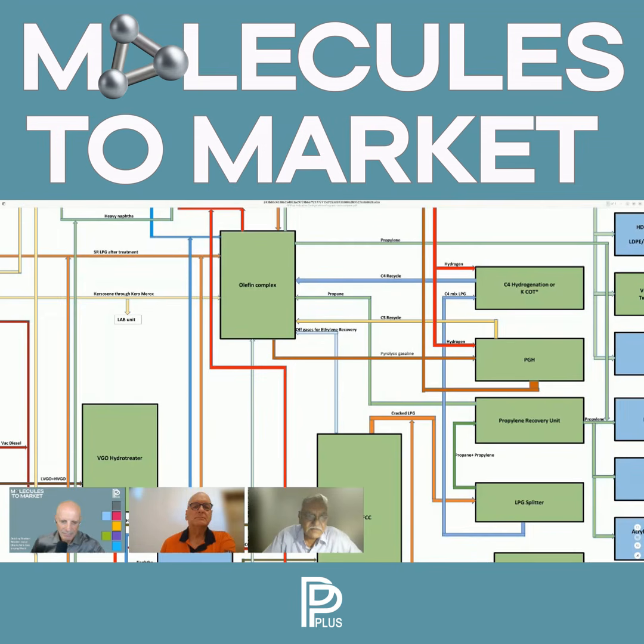This helps me in configuration optimization much better, much faster, because I don't have to do multiple licensor selections, so to say. The caution is, in India, we don't do this thing. In India, public sector undertakings, we do individual selection only, and then select the best based on the NPV.